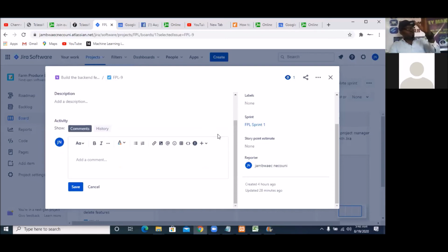So you can actually build out your epics. Once you're done, you go to Backlog, put all your issues. Once you're done, take them to the sprints and to the to-do. Then when you go to to-do, you can add the epic to affect the very issue that you're looking at. You understand? Because when you finish all these issues, after the to-do, you have the in progress, review and done. When you are done with all the issues under an epic, that epic will be set to completed, isn't it? So that when you do your report, it will be effective.